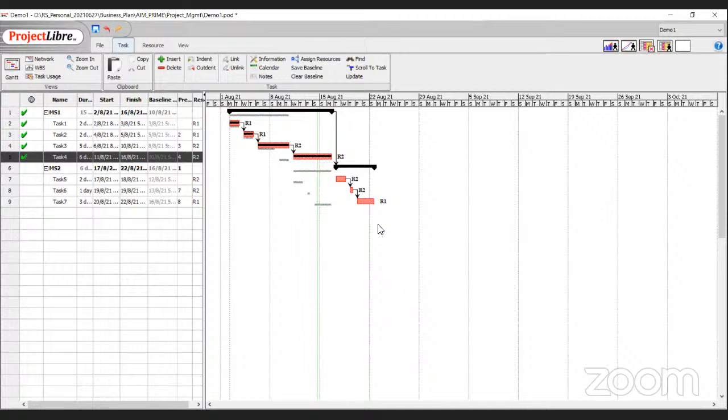Now, I kept on repeating critical path because remember, you're going to have many, many activities which are not on the critical path, right? What is the critical path? It is the summation of those activities which together contribute to the longest possible time. So it's going to be certain select activities which will contribute to the longest possible time. But there will be many activities which do not contribute to the longest possible time, right?